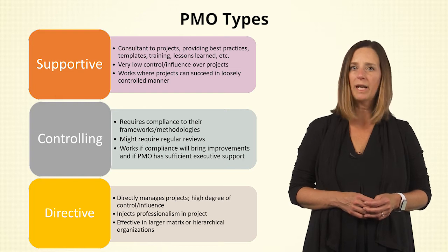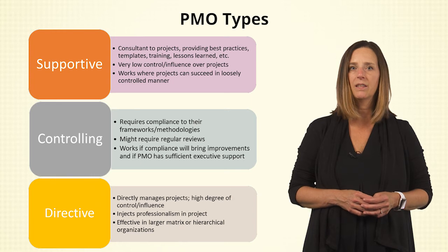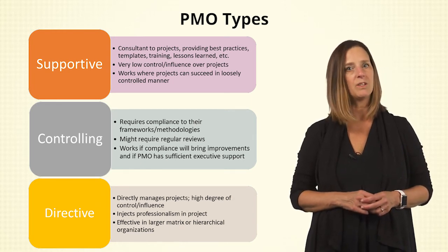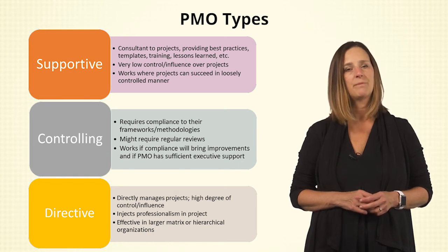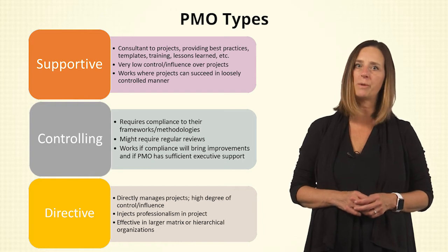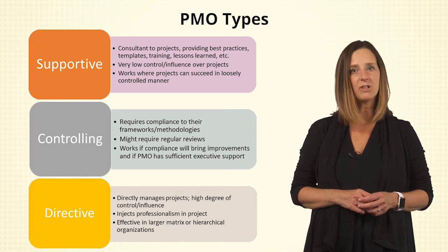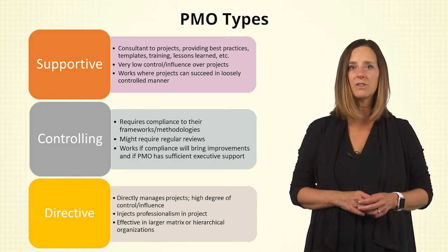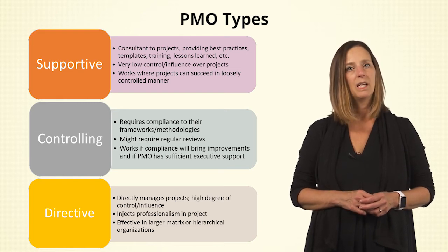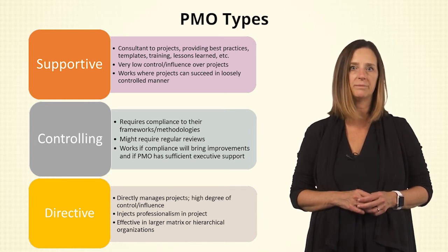This type of PMO directly manages projects, thus the degree of control and influence is very high. This type actually takes over the projects by providing the project management experience and resources to manage the project. As organizations undertake projects, professional project managers from the PMO are assigned to the projects. This injects a great deal of professionalism into the projects, and since each of the project managers originates and reports back to the directive PMO, it guarantees a high level of consistency of practice across all projects.